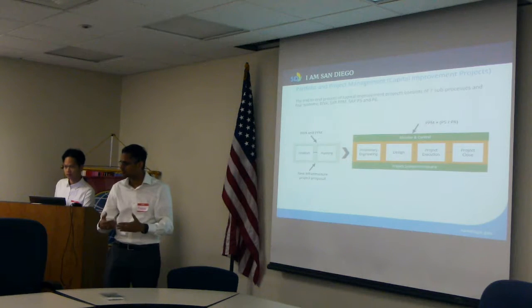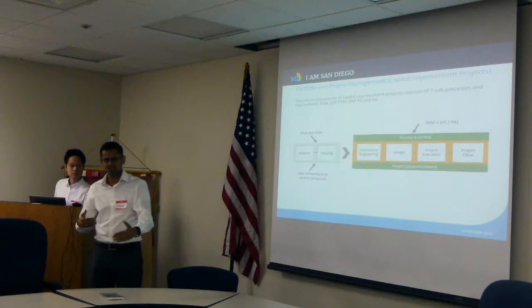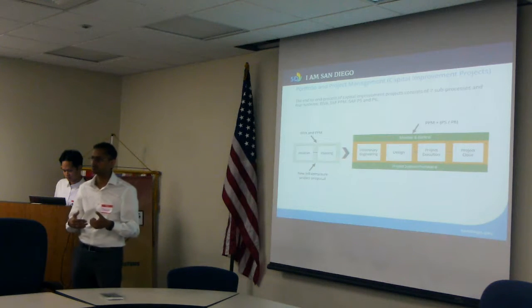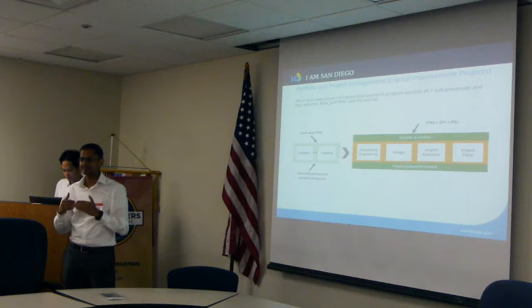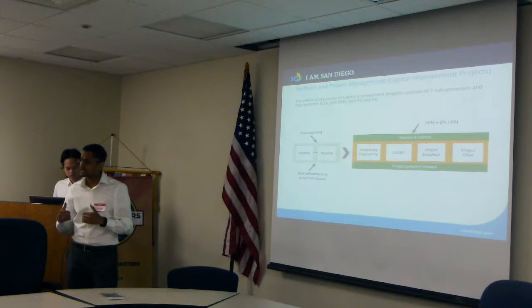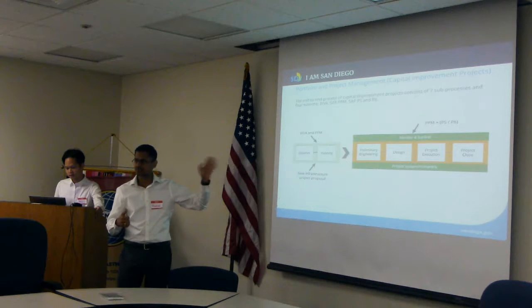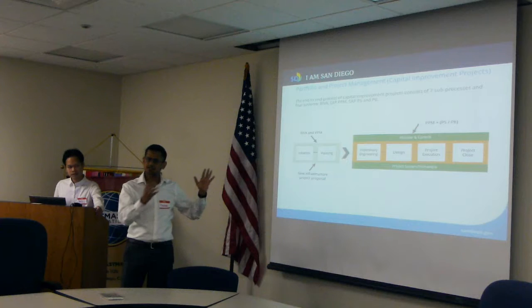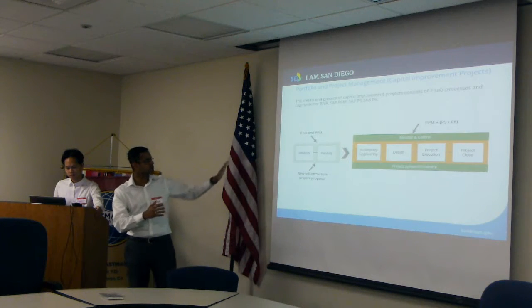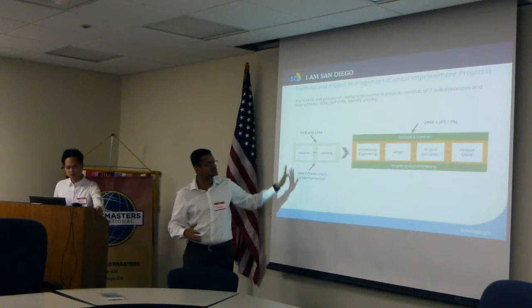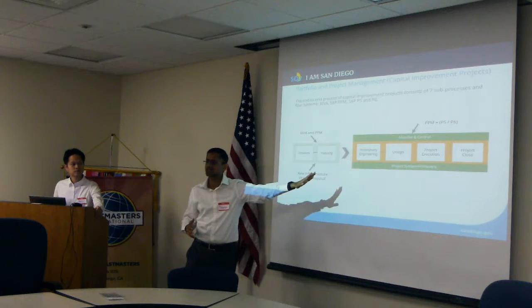or is using for building projects and executing projects. We also have P6 where we perform scheduling of that particular project. We put in activities, we drill down to a little more detail. We schedule data in P6. This information is fed back into PS. But as a predecessor, we would be implementing these two tools called Riva and PPM, where you see the flow of data going in from these two systems into the existing systems that city has.